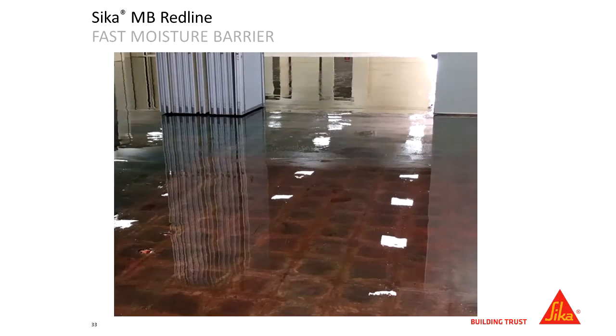Here you see the red line cured out. It has a red color, obviously. Again, single coat application. You get the full moisture protection with one coat of this. You get anywhere between 250 to 300 square feet out of a unit. I usually tell people when they're figuring jobs to work around the mid-level of it, around 300 square feet. But obviously, it's based on the porosity of the slab, but also on the surface profile of the slab. If you have a slab that's just really beat up, has exposed aggregate, obviously, you're going to lose a lot of your coverage. If you have a CSP of 1, or even a little bit higher, like a broom finish, you're going to be able to stretch that a little bit because you're not gobbling up as much of that material with a rough surface.